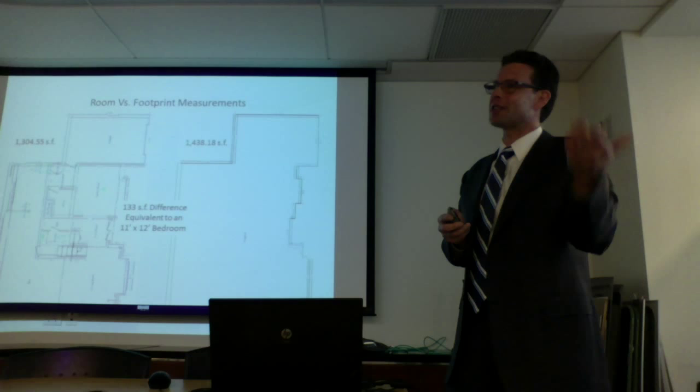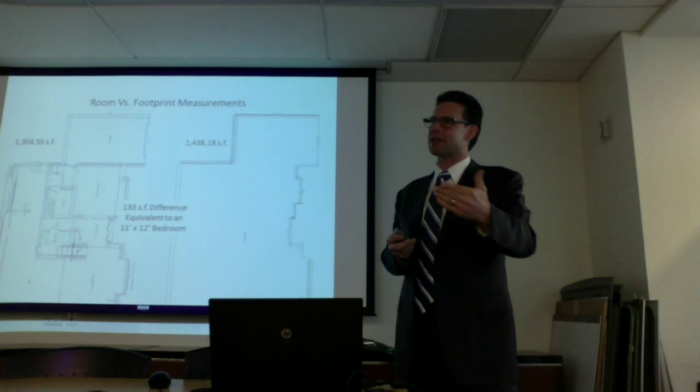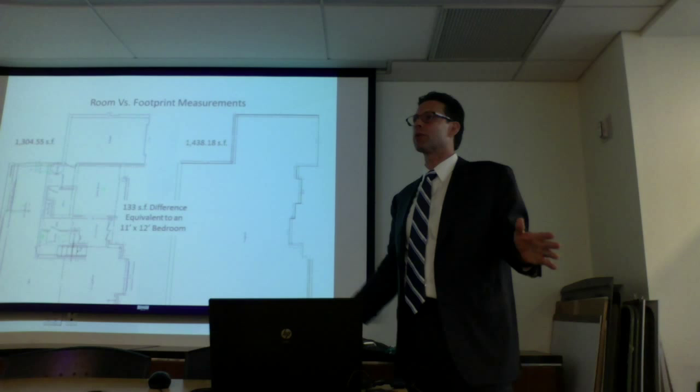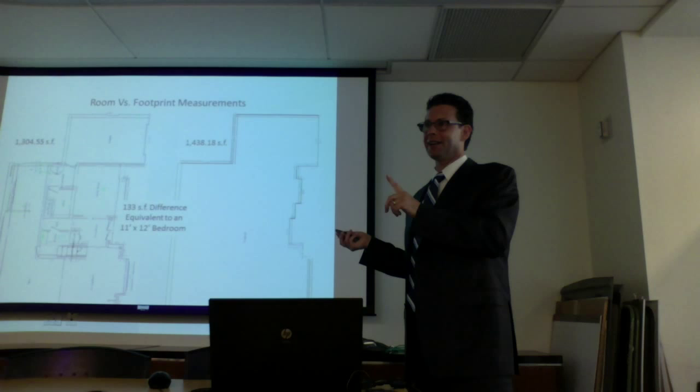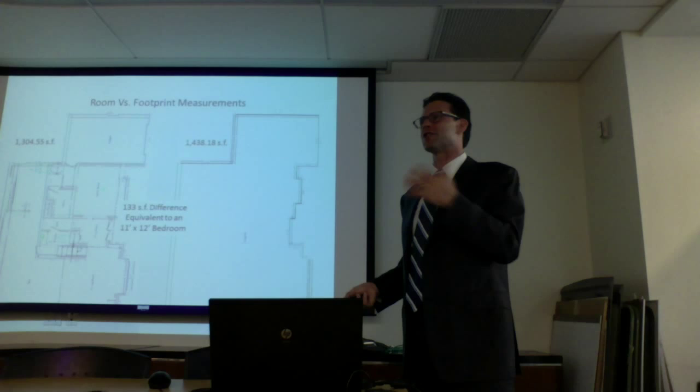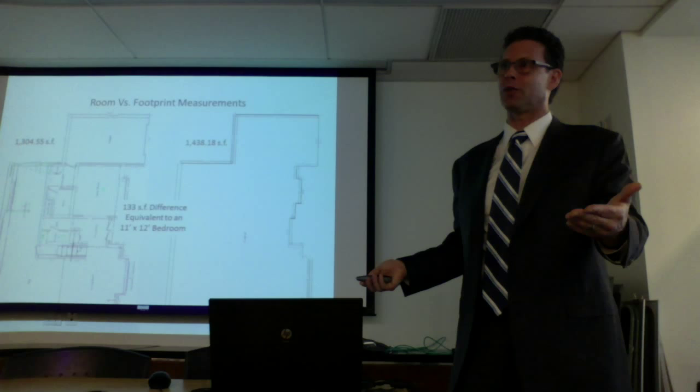Not only that, but when you talk to Xactimate, which I've done, and ask what they are including in this price, imagine a deck, a brand new house where they put the framing in, they put the subfloor in, and they don't put walls up yet. The price in Xactimate to remove and replace a subfloor assumes it's dry, assumes you're doing all of it, and assumes there are no walls on top of it and no staircase on top of it. So they have line items to remove wet subflooring.